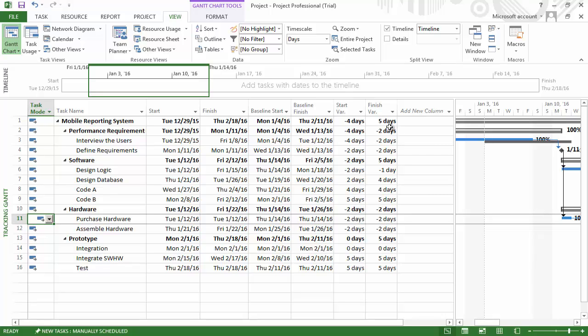A positive variance tells you that you are behind schedule, because we take the planned number of working days and we have to add 5 days onto that in order to get the current planned number of working days. Remember that the schedule variance told us that we had completed $900 worth of work that was not scheduled to be completed at this time? How can it be that we have a positive schedule variance and we are actually 5 days behind schedule?